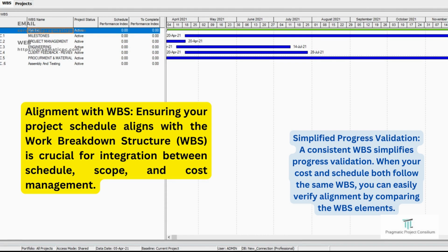Very regrettably, many project professionals often overlook this alignment. To be honest, they are missing this, leading to a lack of synchronization between cost and schedule. Consequently, they often struggle to derive meaningful insights from the earned value analysis, because a fundamental requirement is establishing a strong connection between cost and the schedule. Without this integration, the reliability of your data comes into question.